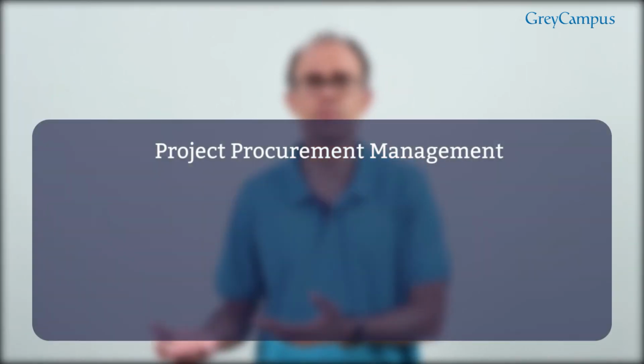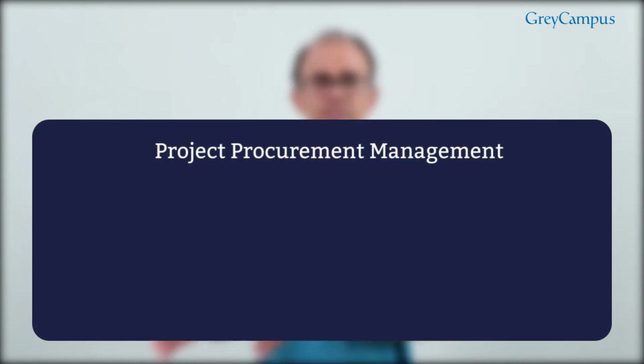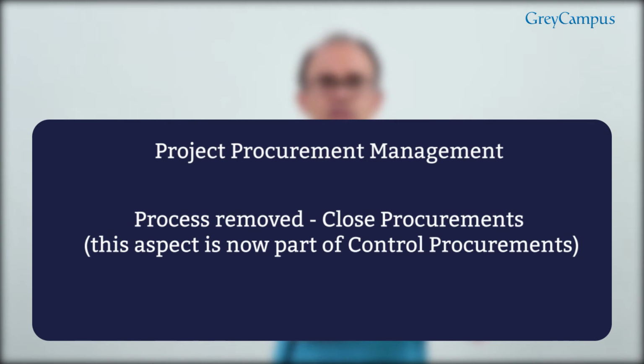And also one last change there is the control procurement process. Previously, we had the close procurement process, but that no longer exists. Close procurement has now been merged with control procurement, which takes care of closing contracts also.